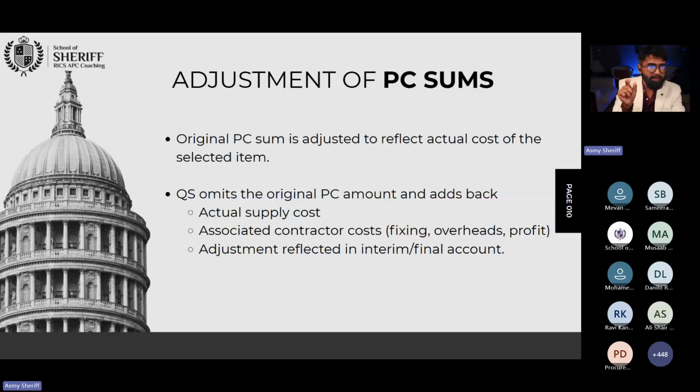So it was 35 riyal, your original BOQ amount. You're going to deduct that. You're going to add 95 riyal. So that's going to be an additional 60 riyal. And plus the contractor requested 5 riyal, 10 riyal, 7 riyal. You're going to add everything. And that will come to the original amount of money he is entitled to for that PC sum.